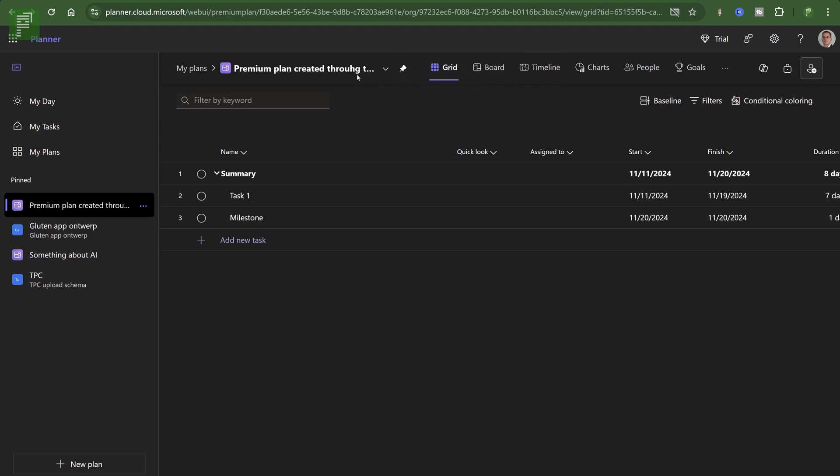Well, can I see that? I have a baseline, yeah. And I have copilot, yes. And I have a timeline. So these are three easy ways to figure out if this is a premium plan. Do you have a timeline? Do you have baseline options? And do you have copilot?